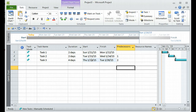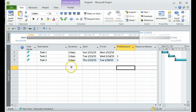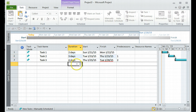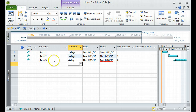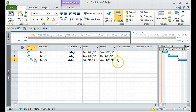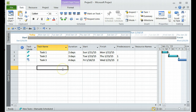Why would you still want auto schedule rather than manual? If I change the duration of Task Two to three days, you'll notice that Task Three's start date hasn't changed — it's kept the date it was originally set to. Had this been auto scheduled, you would see that the start date updates automatically. Typically you want all tasks to be auto scheduled.